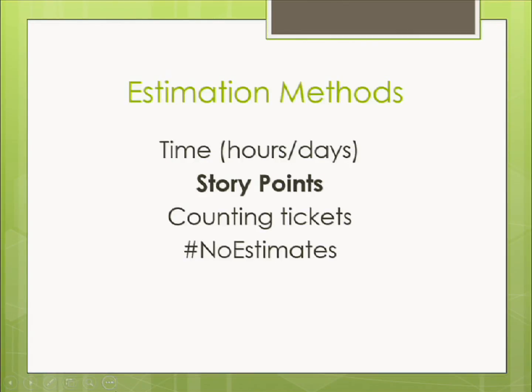This works best if, let's say that you're working for a consulting company and you're going in to do a project at some client, and you don't know anything about it. Your consulting company is doing the whole thing. You don't have any internal developers in your team, and you've got to try to come up with an estimate. This is where it's much easier to do the relative estimation, and over time you're going to figure out what these story points mean in terms of hours. I don't think that's bad. Ultimately, the whole point of estimating is so we can tell management how long it's going to take. They don't care that this project is 400 story points. They want to know that it's 2 months.